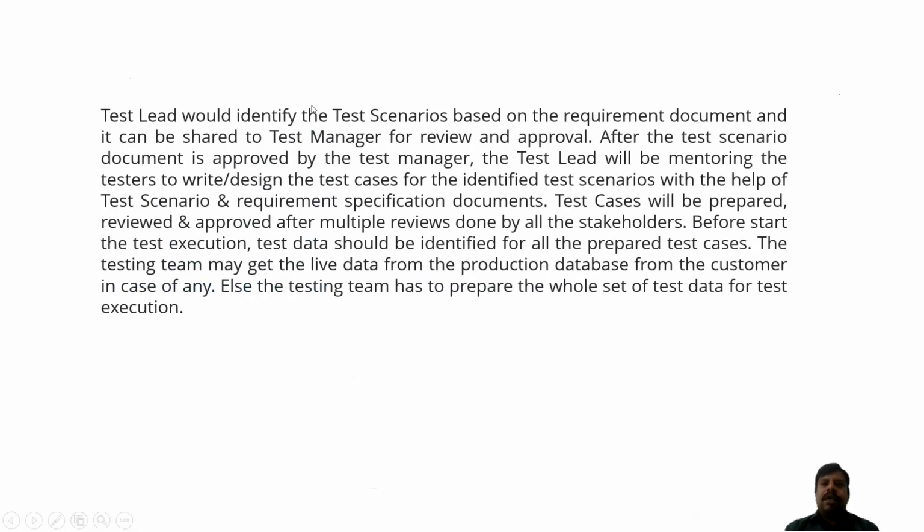The test lead will identify the test scenarios based on the requirement document, and it can be shared with the test manager for review and approval. After the test scenario document is approved by the test manager, the test lead will mentor the testers to write or design the test cases for the identified test scenarios with the help of the test scenario and requirement specification documents.